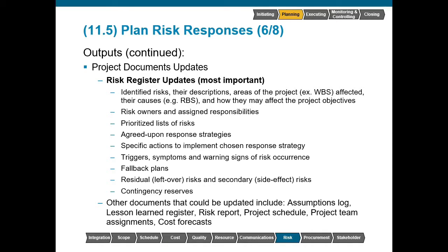There's specific causes, and we can look at the resource breakdown structure and how they may affect project objectives, and we can evaluate impact against any one of the objectives or multiple objectives. The risk owners should have been assigned, and we should have their assigned responsibilities as well, such as the periodic reassessments and the frequency with which they will do so.